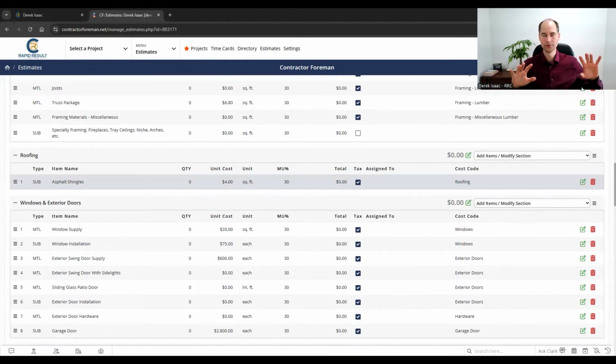Typically speaking, when you're going through this process, the way that I like to run it is you'll have some sort of ballpark calculator, which is probably just a spreadsheet, or it could be a template like this where maybe you've got 5 to 10 numbers you put in, and it'll give you a ballpark scope or scale of, this is a $1 million home or this is a $1.3 million home or whatever. And then you can give that to your client very easily and right away know, is this budget worth pursuing? Or do we need to go back to the drawing board? Or are we not the right fit for this client because they're looking for something a lot cheaper, right? So typically that can weed out a bunch of people.